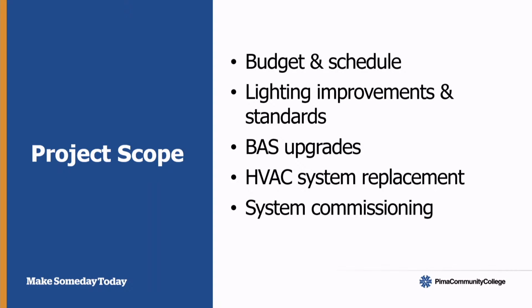The project budget was set at $14.2 million. That covered construction as well as contingency in that cost. In May of 2022, a notice to proceed was issued with the planned substantial completion date of April of 2024. There was an impact to the substantial completion date, moving it from April of 2024 to April of 2025. Later in the presentation, we'll go into a slide that breaks out the financial details into a table for everyone.